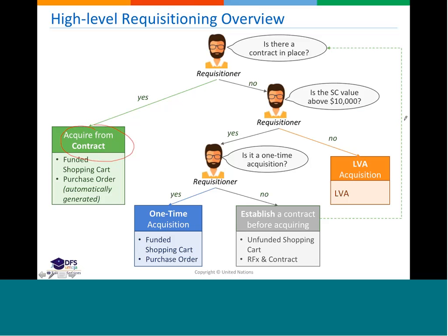There is another question that says, can I acquire materials through a new contract, even if there is already a contract in place? Yes. Each one of the missions has access to the contract catalog, to the system contract. In principle, what is advised is to use the product IDs that are already under these contracts.